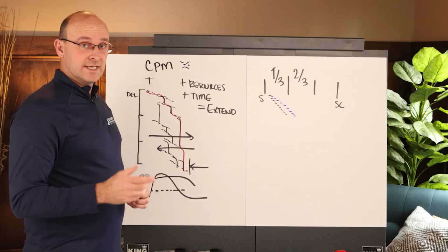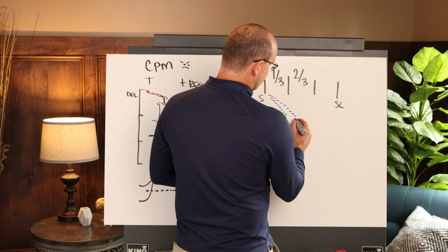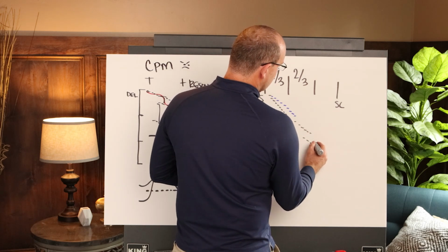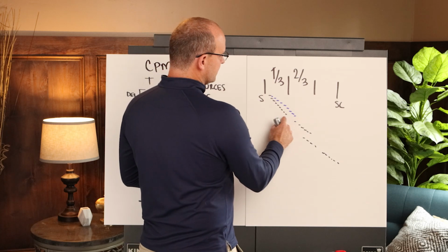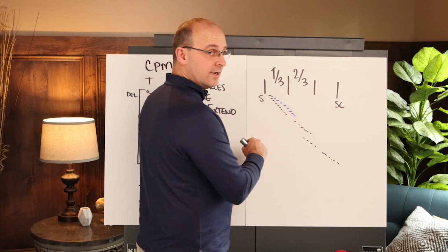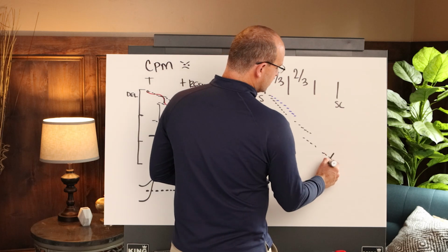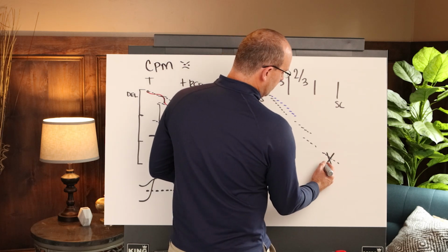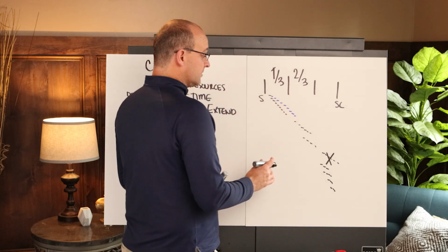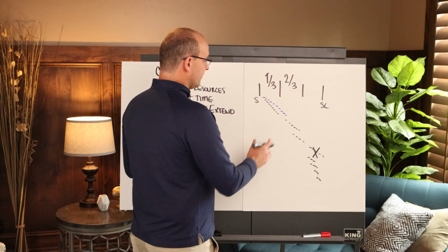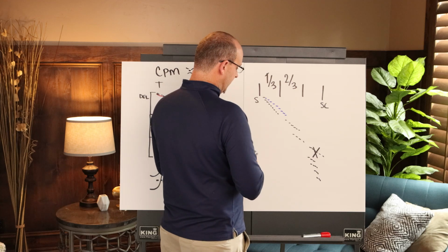Now, what's interesting is at the end of your project schedule, you probably had some nice flow built into the schedule throughout, but the schedulers will start to see, and the supers will start to see, oh, we have a problem here, so we have to go ahead and dissolve logic. So instead of having this nice flow, they'll start to say, oh, we can stack, to attempt to recover. Okay, so then in the two-thirds point over here, you have even more of it happening.